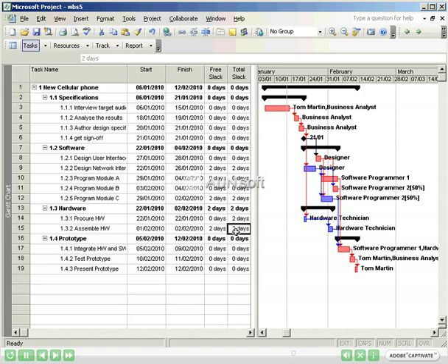If we had a task with a duration of 40 days and only had 1 day of free slack, then there is a higher probability that the task will not complete within the slack, and therefore higher sensitivity. Our project has a high sensitivity given the high percentage of tasks which are on the critical path. In doing this analysis, you not only have a critical path, but you have an analytical understanding of its likelihood to change, and can discuss this with your sponsors and team members.